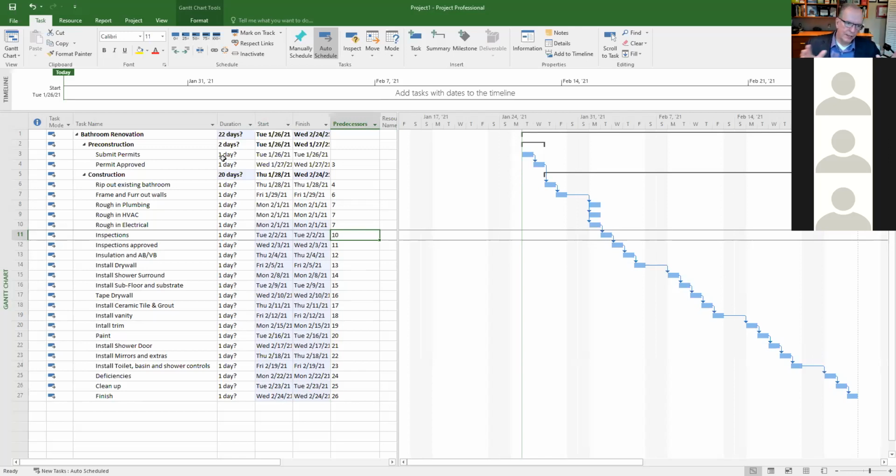You've got this pressure: you want to get in and you want to get out, and the longer you're there is a cost. On the other hand, if you have too many people there, it's a waste of labor because people are standing around in each other's way. So you've got to get the nuances of that, and the nuances change by project, by physical space, by resource availability, a whole bunch of factors. So that's part of what we have to think about.